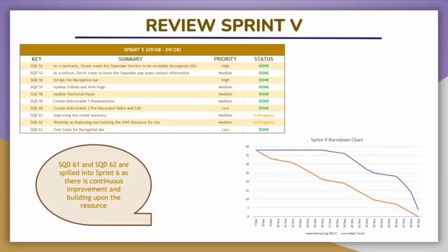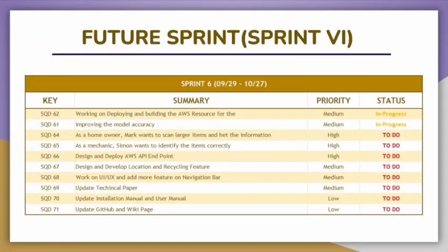So if you take a look at the burndown chart, you can see that there is a gap in the expected story points from the sprint, meaning that we still have two tasks pending, and we currently are experiencing a spillover. So talking about spillover, we're focusing on what stories we could focus on until the next sprint.